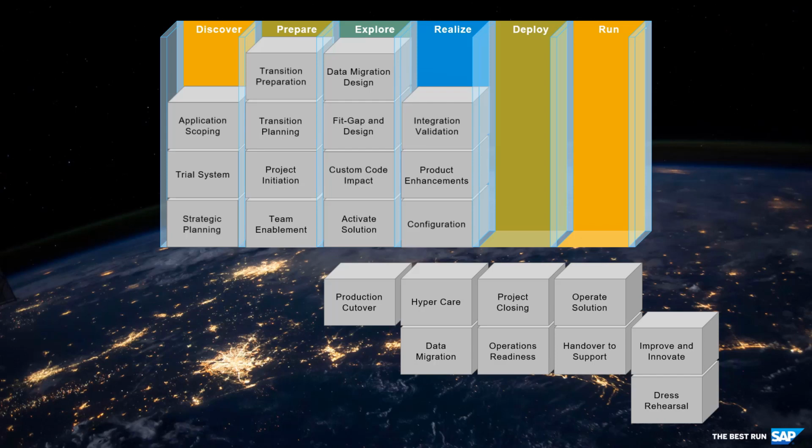The organizational framework for each integration validation project is provided by the Innovation Control Center, which is formed from the Customer Center of Expertise location. It unites customer experts, partners, and SAP staff as one team. Every mission-critical application and technology component is represented, as well as every implementation and operation services provider. Main aspects of integration validation are data consistency, business process monitoring and exception management, as well as performance and scalability.